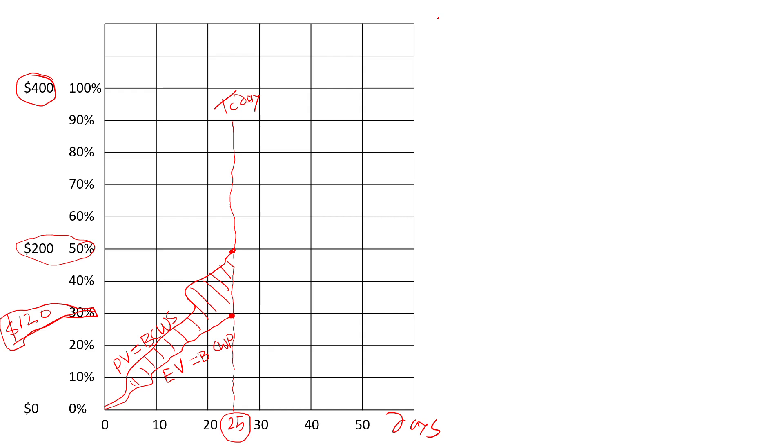There is a measure, there is a measurement for that which is called the schedule variance. We are behind the schedule. We're just trying to put a number in there so we understand a little bit easier. The formula for that is the earned value minus the PV, the planned value.